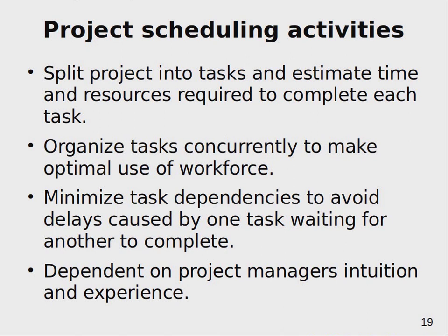And by time, usually you think about actual effort, not calendar time. And then you can check how this effort can be parallelized and how you can calculate actual calendar time from the effort needed. And of course you try to organize tasks concurrently as much as possible, especially if the project is large and complicated and you have a large team. For this team to be effective, of course you have to have a particular task for each member of your team.